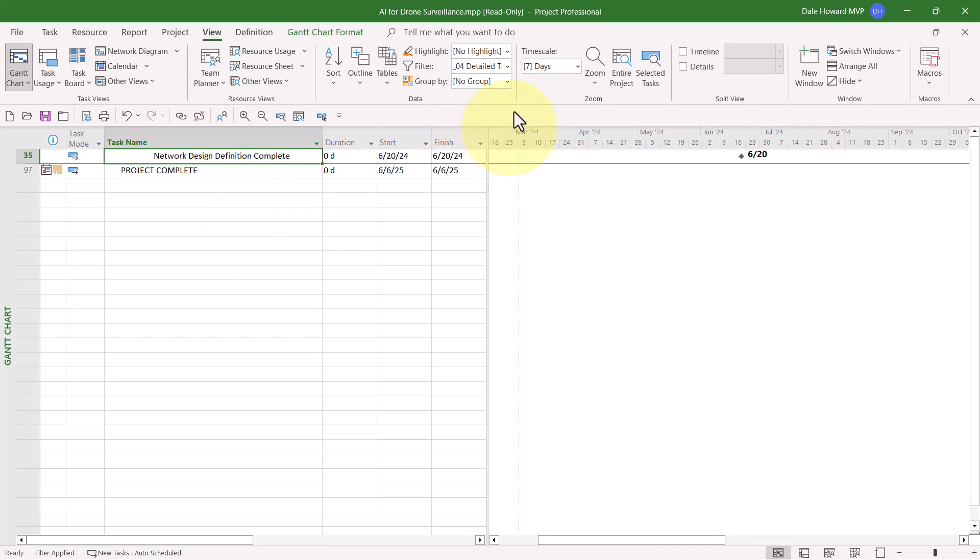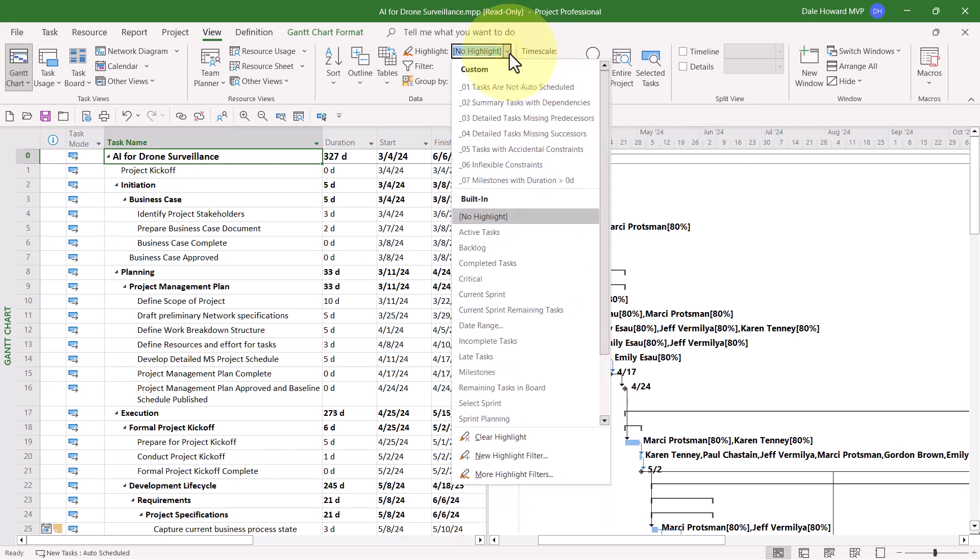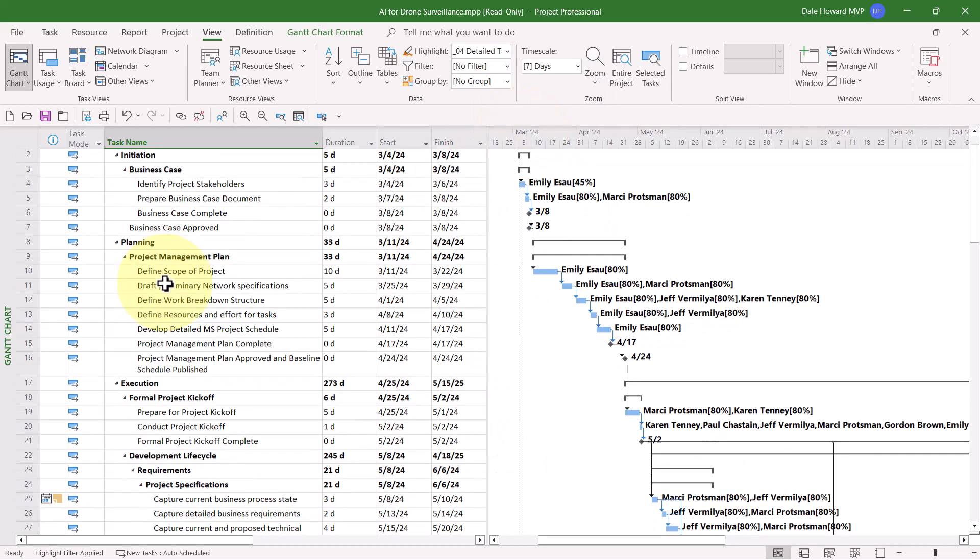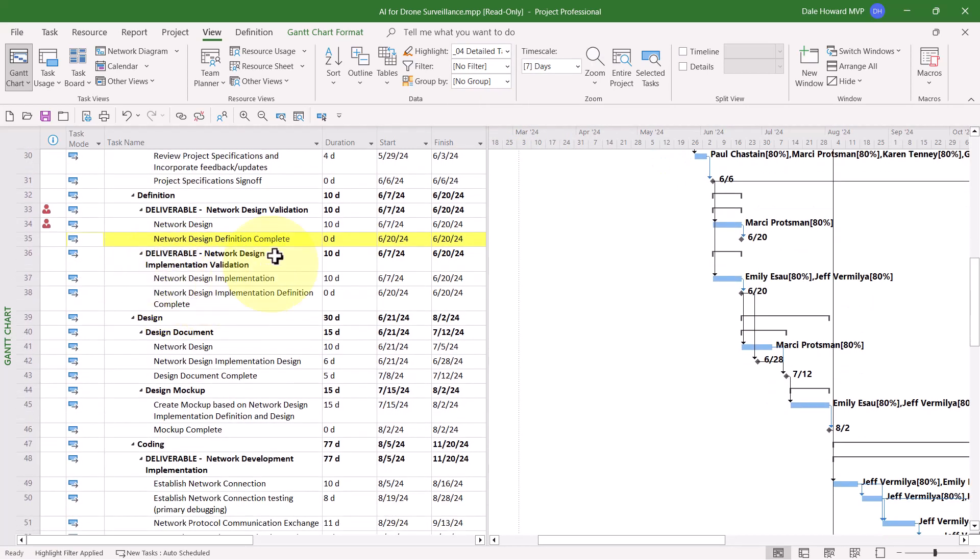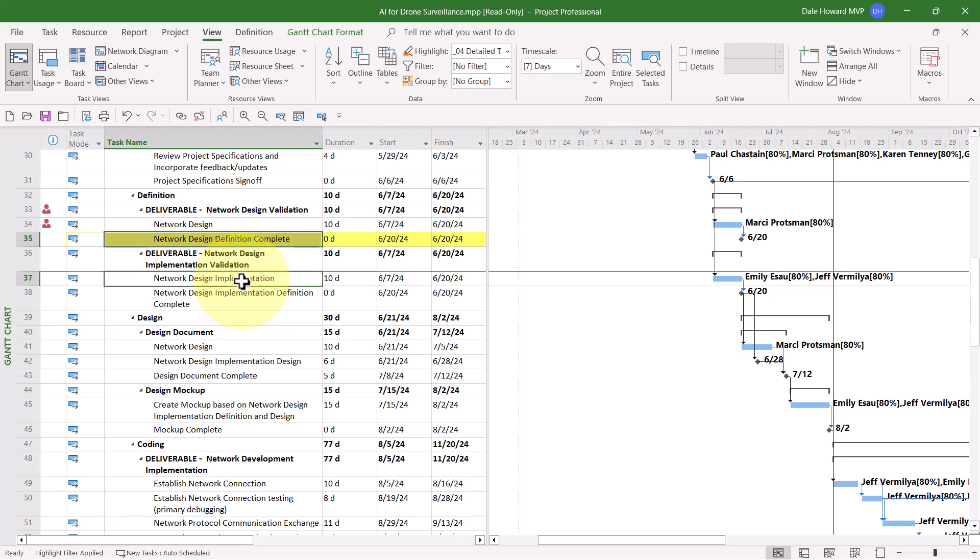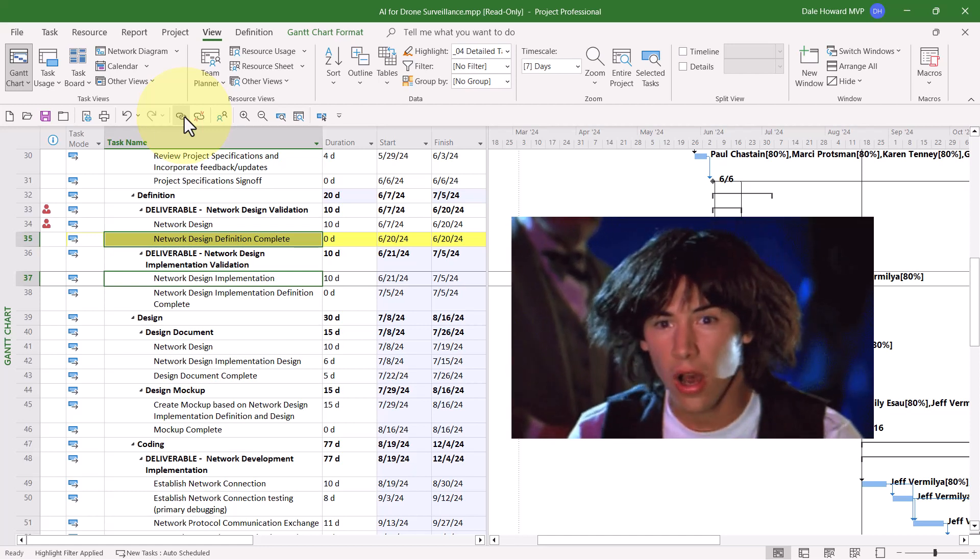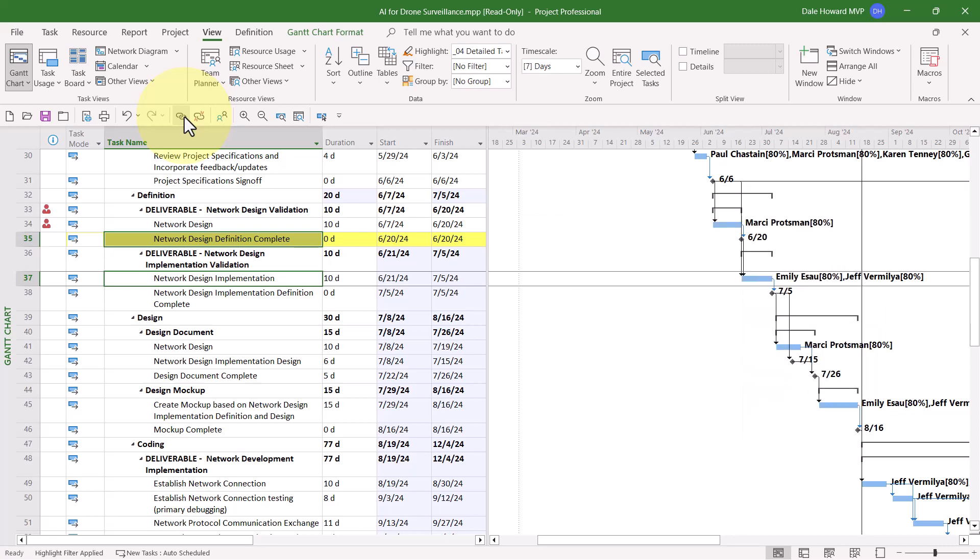So to solve this problem, I'll use the same technique that I showed you previously. I'll first remove the filter, then I'll click the Highlight Filter Pick List button, and choose Detailed Tasks Missing Successors. Then as I scroll through, here's task number 35, highlighted with the yellow cell background color. It is an unlinked milestone task. It does need to be linked with a successor, and in our case, it would be task 37. So I'll select task 35, I'll also select task 37 using the Control key. Then I'll go ahead and link these two tasks. Notice that that does change the schedule of the remainder of the project, which means I didn't have an accurate schedule because of that one dependency that was missing. So this is a very good thing.